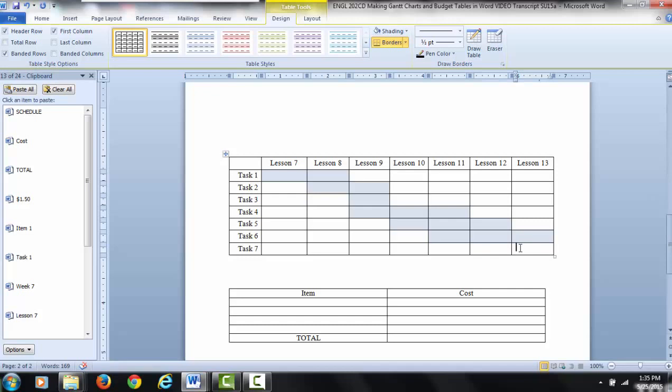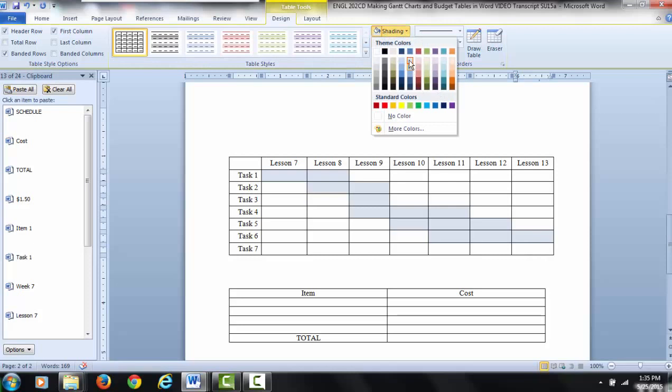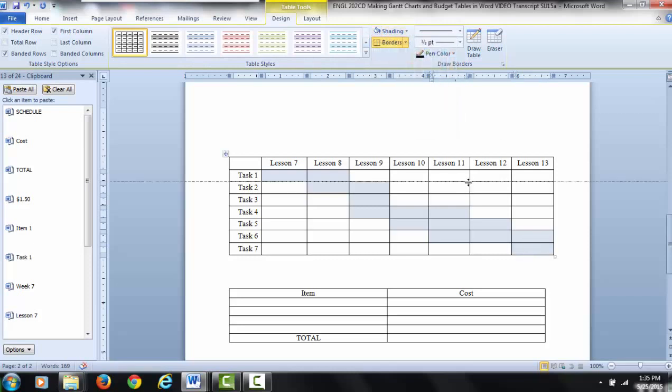And as we go down through here, you can see how this is a progression over time, but there's a lot of overlap in here. If you have something that has no overlap, then that's probably something where you want to rethink how you're planning it, because more than likely that isn't a realistic plan, because quite frankly that isn't the way things happen that often.